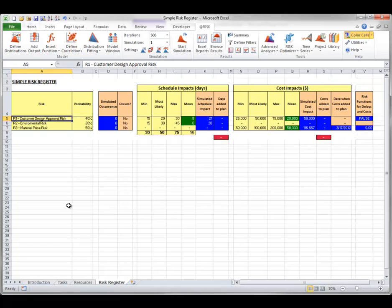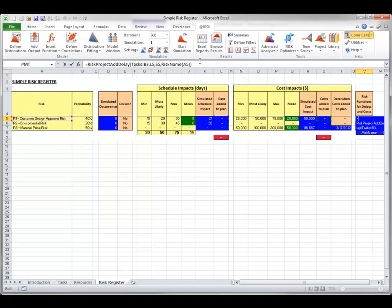This new task will take place after the original design task, perhaps due to added design revisions and reviews, and has a varying length and cost as calculated in the register. When appropriate during the simulation, the At-Risk function Risk Project Add Delay adds this new risk-related task after the design task. You can look at the formula in cell V5 on the register sheet. Its first argument is a reference to the task where the new task will be inserted — in this case, after the design task B3 in the tasks sheet — and the existing successor tasks to design will now come after the new task.